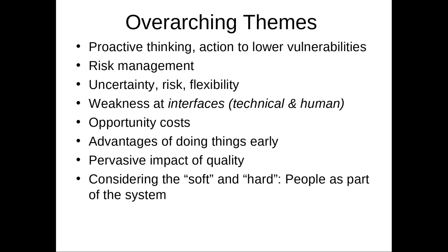So rolling things out in an appropriate order, in an order that perhaps lays the technical framework for going a different direction subsequently. That's an important insight. Flexibility is also achieved, ladies and gentlemen, through processes. Having people shadow each other so that one can take up the position of the other in the event of sickness. Flexibility in terms of who does the work by spreading knowledge around the team, spreading knowledge in the technologies involved, so multiple people can work on a given task. Knowledge about how the build system or the continuous integration setup, the smoke test works, so that multiple people can work on it. Flexibility has value. There's a whole field called real options focused on the value of flexibility, and it has real value in the end. We try to raise our bus number. What is our bus number?